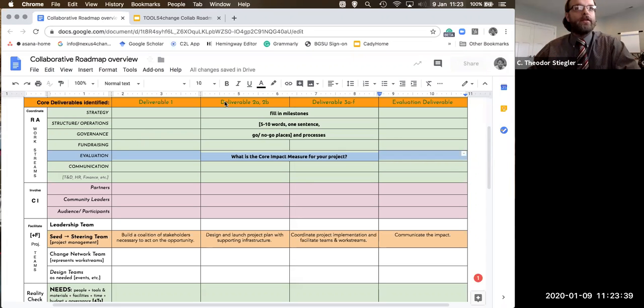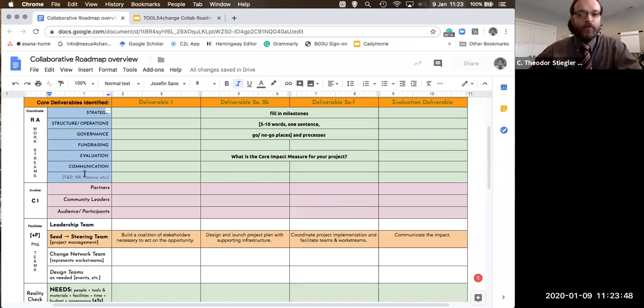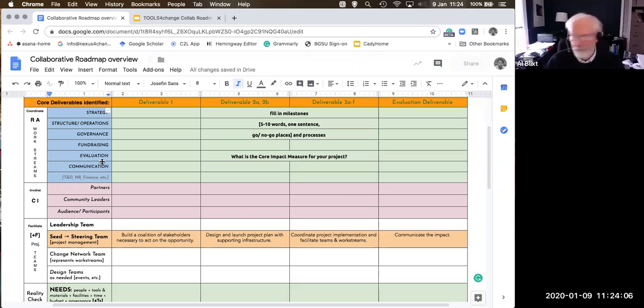So one thing that I maybe didn't specifically say, but that's important: depending on the scope of your project, any of these groups here in the RACI bracket might be one-person teams, in which case that is the person who is both responsible and accountable. For any other grouping, each of these teams, let's say the evaluation team, needs to have a leader or a spokesperson that holds the A, as you point out, and then can delegate whatever the tasks are to those that have the R.